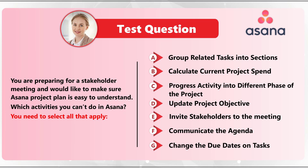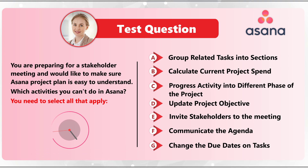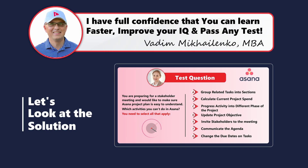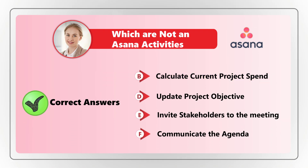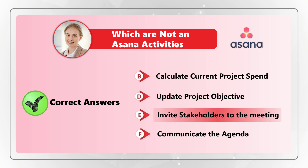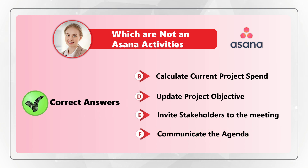Take a close look — give yourself 10 to 15 seconds to see if you can get to the answer. I think this question is designed to trick you. I think choices B — calculate current project spend — choice D — update project objective — choice E — invite stakeholders to the meeting — as well as choice F — communicate the agenda — represent the right answer, because these are not typically Asana activities.